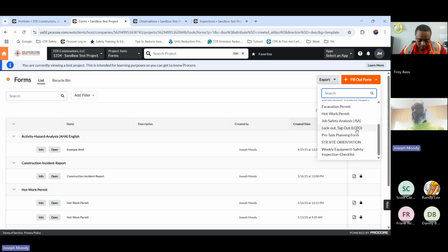We're just going to do PTP, and the PTPs are for a week, which just means whoever the sub foreman is for the week, just give y'all a breakdown. It's easier if you do them while you're doing your toolbox talks or your foreman meetings. This is probably the best time to have them tell you what they're going to be doing for the next 5 to 7 days or whatever, when you do your toolbox talk or your weekly foreman meeting.